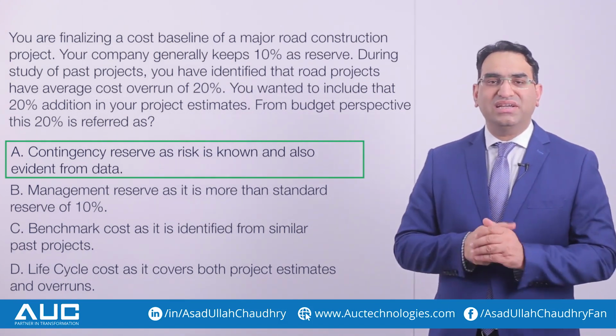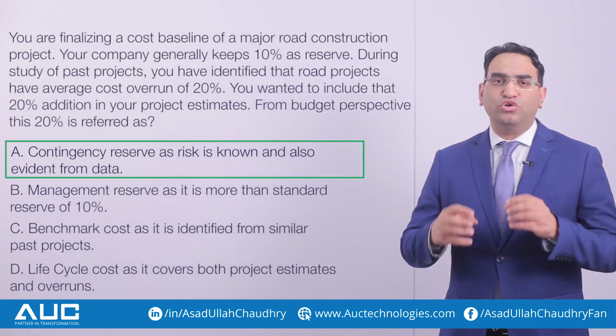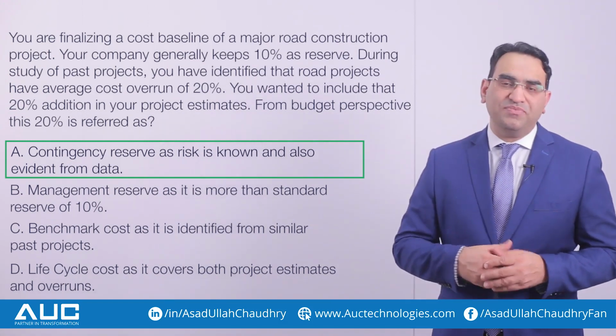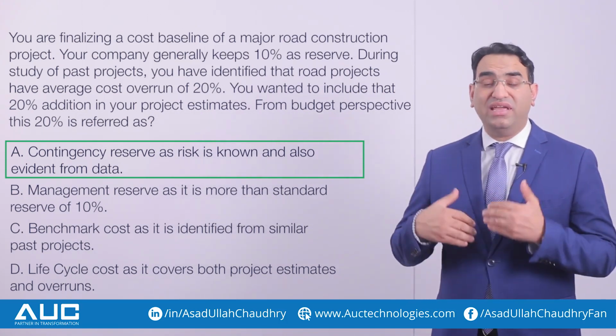Option number B says these are management reserves. No. Management reserves are for those risks which are referred to as unknown. And in Oxford we call them black swans. So here we are not talking about black swans. We already have the data.